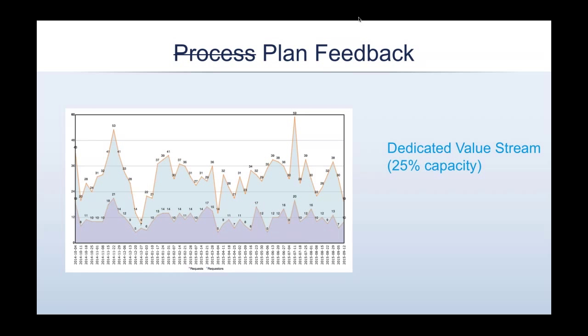So it's like 10, 15 new requests, 30 times requested a week per new user. That's the scale of the data you need to manage, process and plan. If you don't do it, you will get to the unmanageable backlog again. How do we do it? We again follow the Scaled Agile framework practice. We use the value streams, so different backlogs and different capacity. In our case, we dedicate 25% of capacity to process the actual feedback from existing customers to the software that has been released.